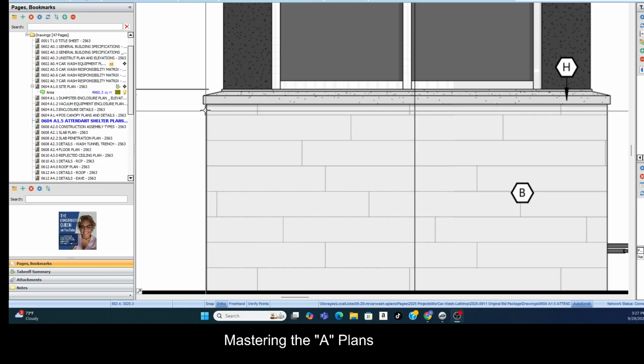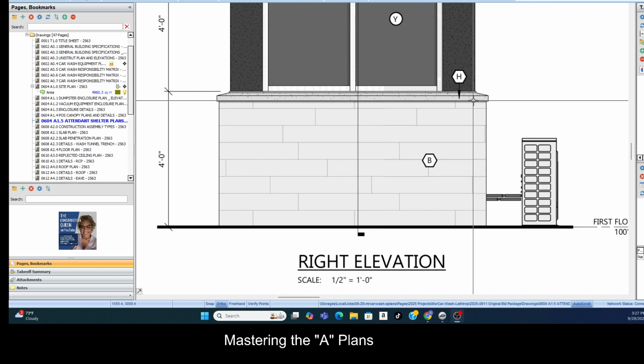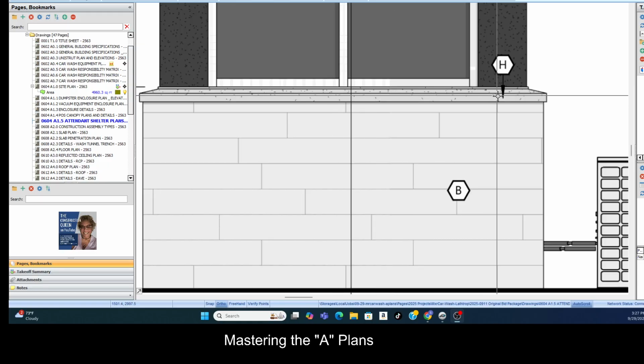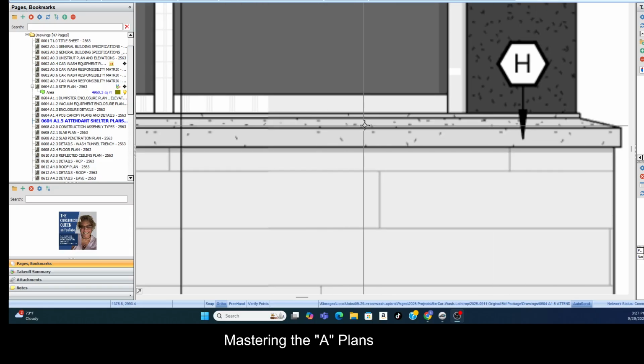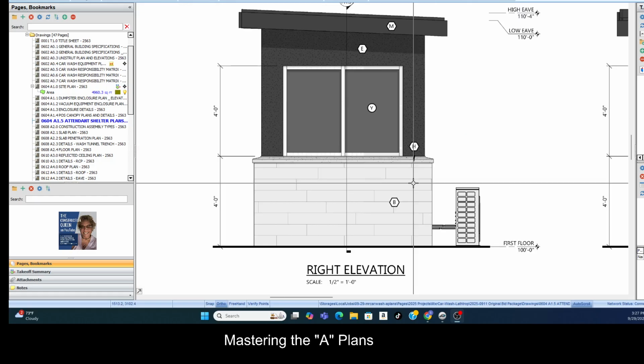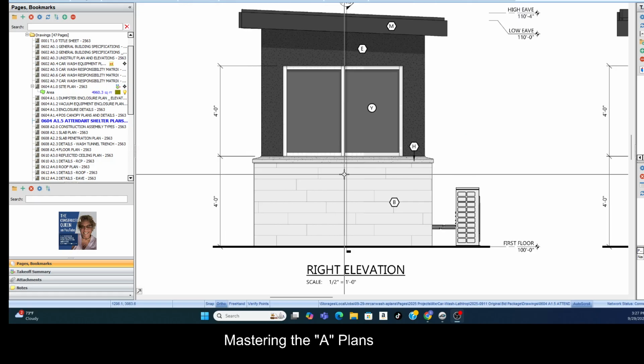And I can also measure the rim of it and determine what that area is, or how many cubic yards if that's concrete, breaking it down into this section and then that section. I can determine area, and then I can determine cubic yards.